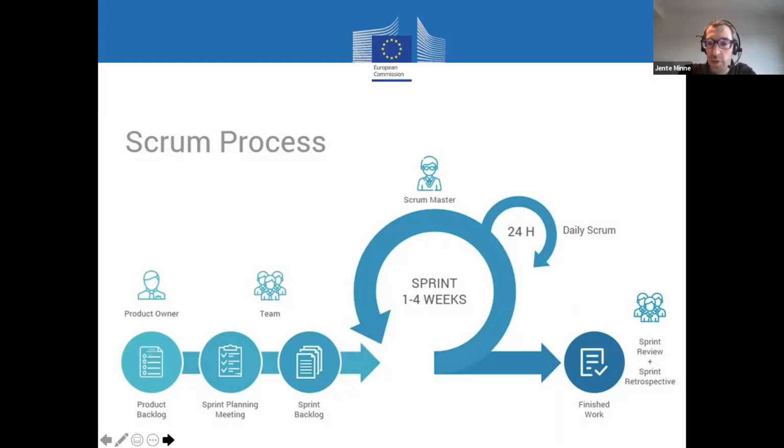And basically for these 3 weeks, you will work all the time on this project. And every day you will have a daily Scrum. It's a very short meeting, normally 15 minutes. And I'll explain in detail also what it is. And during that, you have a Scrum Master, which is the person who will represent the development team, or the implementing team if it's not IT.